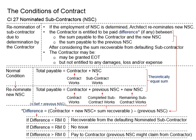We can extend these differences into three possible scenarios. First, if the difference is equal to zero, that means the total payable by the employer has been fully utilized to do the relevant work, and the total amount recoverable from the nominated subcontractor has been fully used to finance the damage, loss, and expenses suffered by the contractor. In this case, there is no issue — the contractor is not getting extra.